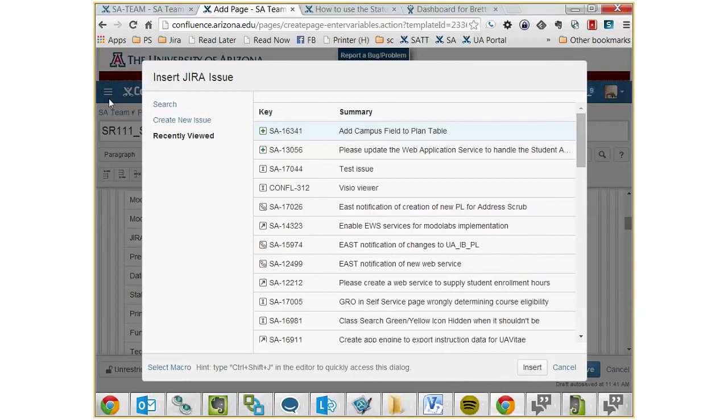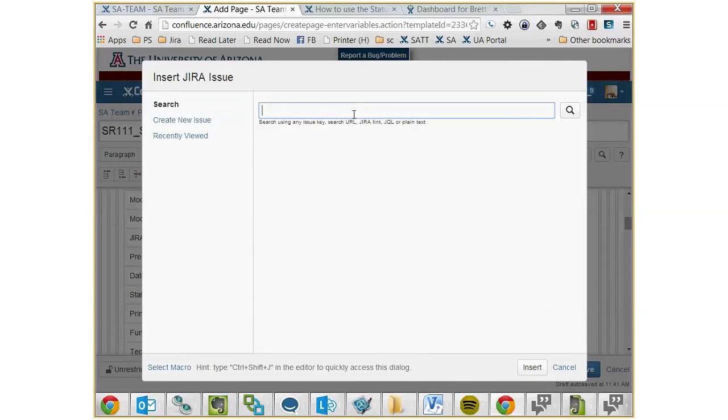I'm just saying, if you know that a project is going to have this ticket, and then a query ticket, and a security ticket, and a move stuff to the query tree ticket, and a notify East ticket, you could put those in a table, and then just one swipe will create tickets for all of those things, which is pretty cool. Anyway, that's later.